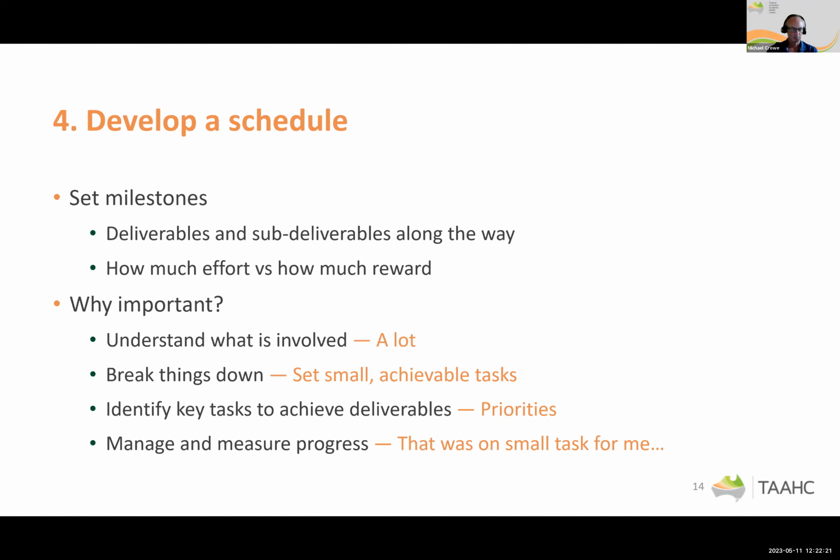One of the big things that we need to do in projects and also in research is to develop a schedule. And one of the ways we do this is to set milestones, which are usually set dates of when deliverables and sub-deliverables are required along the way. And then from that, deciding how much effort is required for each of those deliverables. And it's not just putting in infinite effort for each deliverable or sub-deliverable, it's what reward you get from them.